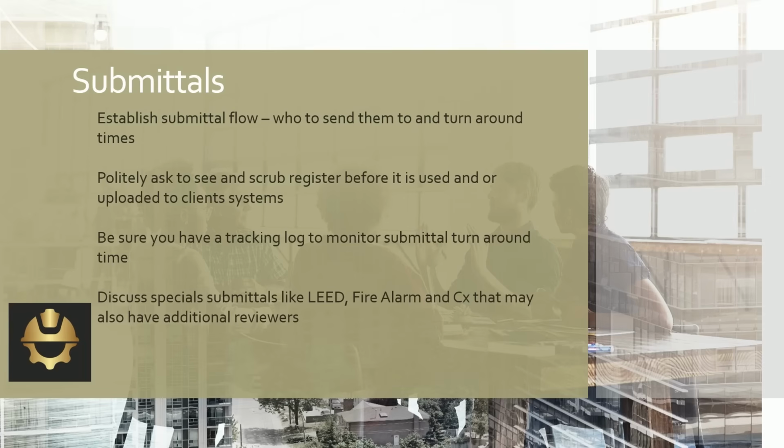So we were able to sit down with our team and the designers, our MEP, right, the main subs, and our design team, and they talked about what submittals we could put in the design package. So they got all that product data together that they had bid and was part of their proposals, and they got it to the design team. The design team approved it.